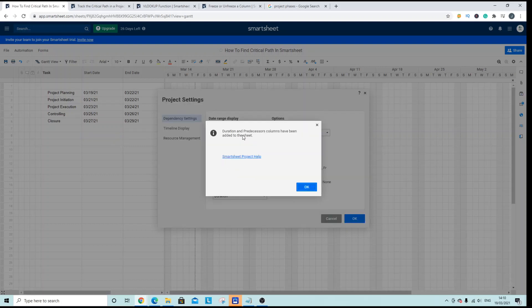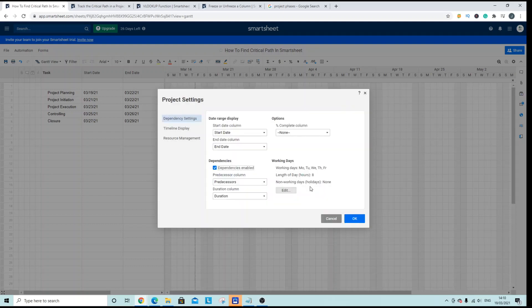And if you don't have these columns in the sheet already then the duration and predecessor columns are going to be added for you and they're required in order to show the critical path. So hit OK and now our dependencies are enabled we have our predecessors and we have our duration.